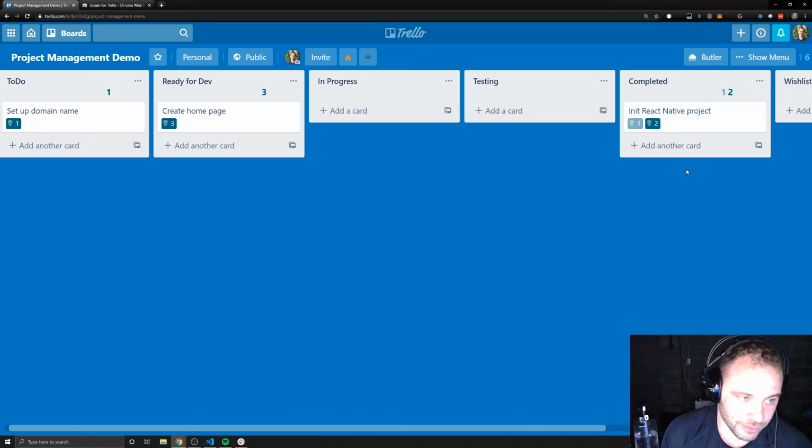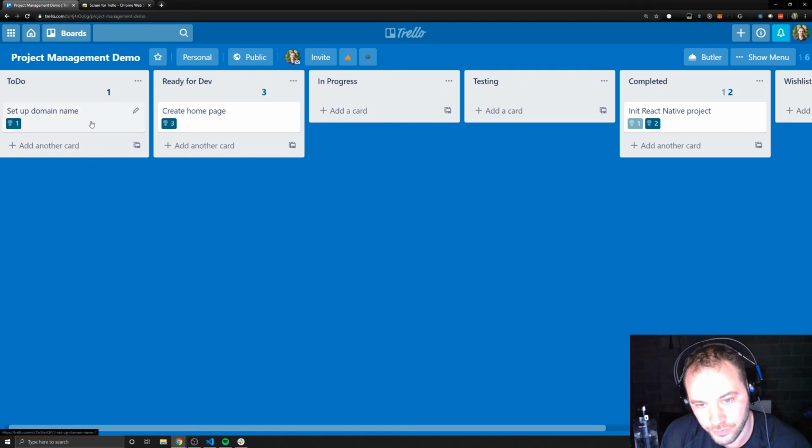The other nice thing about this is, let's say that my boss or the client or somebody says, hey, can you give me some sort of estimate on when this project's going to be done, or when a certain feature is going to be done or something. All I have to do is go over and say, let's say this was all I had on my to-do list. I could say, you know what? It's only going to take like a half hour to be done, right? Because I only have 1 Pomodoro session here, 1 point.